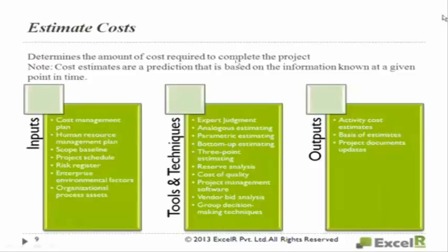Taking data from similar or historical projects available in the organization, from the similar or historical data report. Perfect. So, where you take the values of cost from similar projects as a basis for estimating the same parameter or measurement for a current project. That is analogous estimation. In a previous project to do this, it cost me $10. So obviously it will cost me $10 now. Okay. You do that, that is analogous.